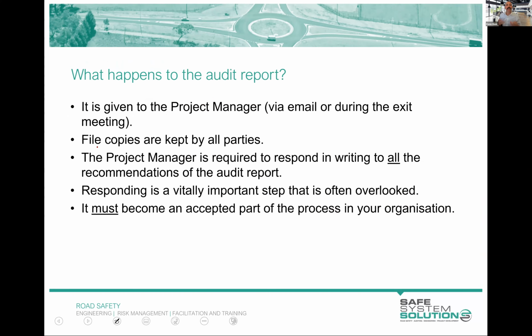So as I mentioned there, it's given to the project manager via email, usually. Keep file copies as an auditor, and certainly those receiving it, project managers, should keep that. Respond in writing to all the recommendations in the audit report to keep on your file. This is for the project manager or the designer or the like. It's nice to give it back to the auditor, but you don't have to do that. Now, the thing is, responding to the audit report is so critical, but it's often overlooked.